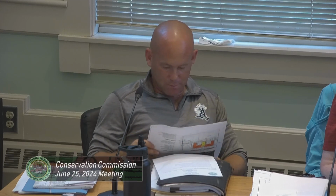And next up is building permits and site visits. Not really a site visit, but today we had an informational meeting regarding Zero Summer Street. They're looking to kick off work towards the end of the year. So really, the main thing for Concom will be they're looking to submit the building permit application sometime in August. We want to obtain the permit by September, so whoever the chair is will have to sign that. Notice to proceed will be October 2024, construction to start November 2024, so you guys are probably gonna want to set up a pre-con meeting for sometime in October, if the schedule stays like this.